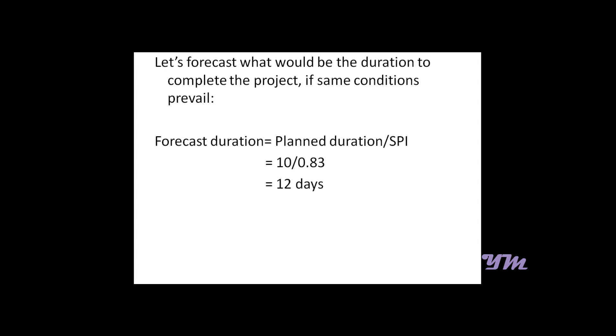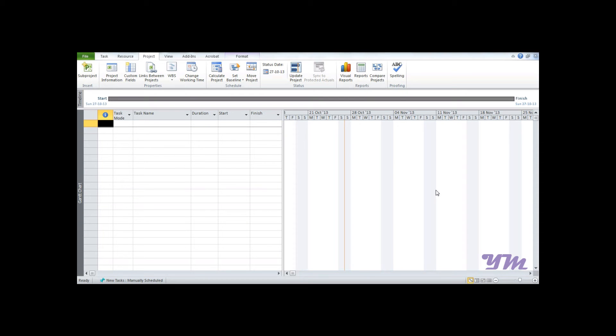Now let's forecast the duration of completion. The planned duration upon SPI gives us a forecast duration, which is 10 divided by 0.83, which gives us 12 days.